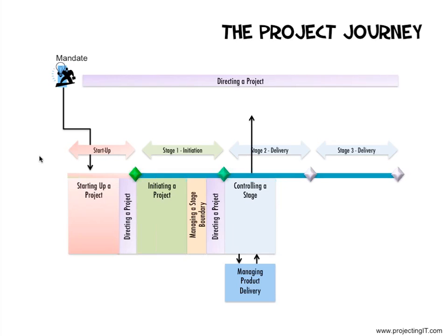When stage 2 is about to complete or has completed, the project manager's job is to see how stage 2 has been delivered. So the project manager will analyze how the plan has been completed, the planned versus actual, whether all work has been completed as agreed, whether all deliverables have been accepted by the users, and also see the lessons learned during stage 2. The project manager will check the PID to see if the strategies and plans are working.